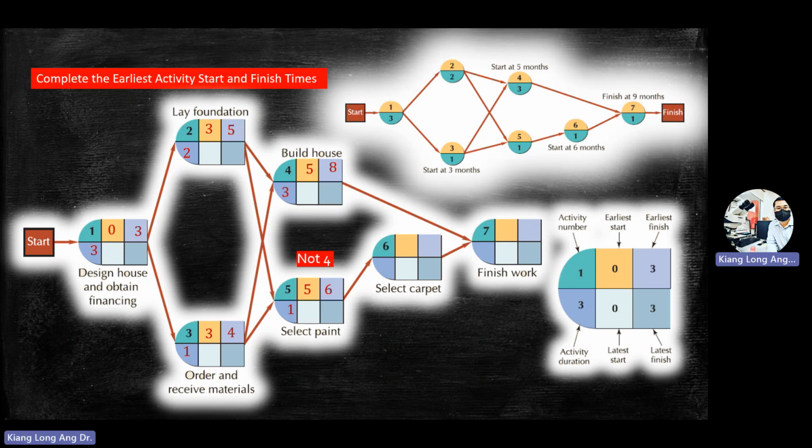Yeah, so we always choose the biggest numbers. Same with other 1, 6, and then 7. Then 1, 8, 9. So far, okay, yeah? There's one hidden rules there. Always choose the biggest numbers for the orange color or the yellow color box. This is forward pass. We call it forward pass. Always do forward like that.